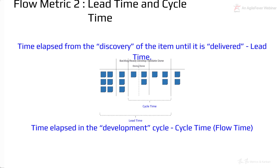We are defining lead time as the time between when an item is discovered until the time it is delivered — from the time the customer has brought it up and it has found a place on one of your boards, till the time it is actually delivered in the hands of the customer. Cycle time is defined as the time elapsed in the development cycle, from the point where the team actually gets involved to pick up the story and do the actual development work.